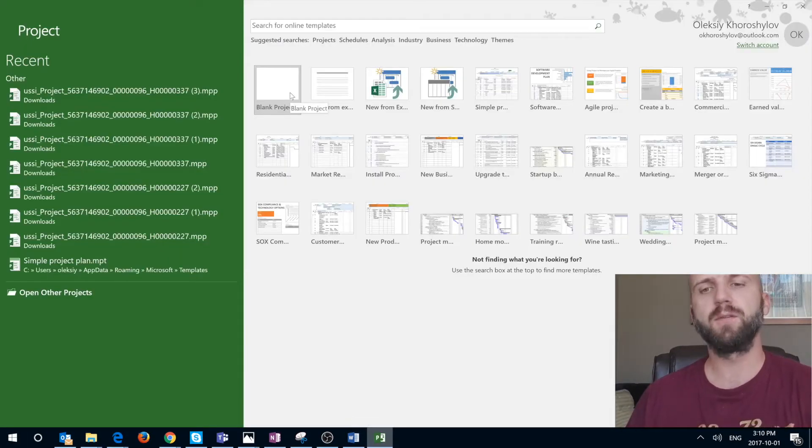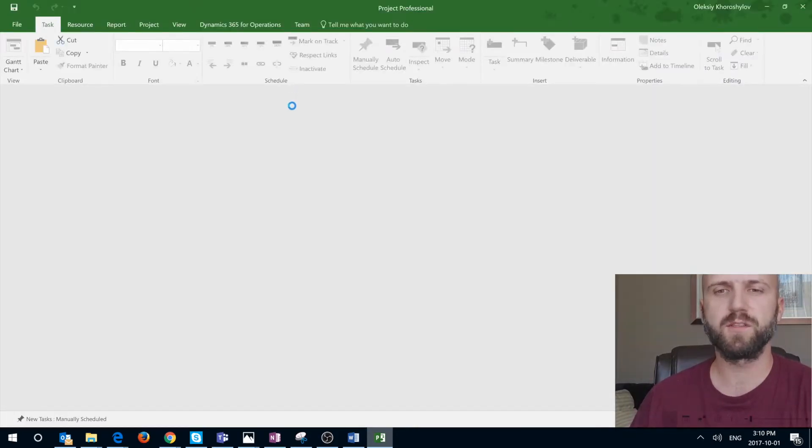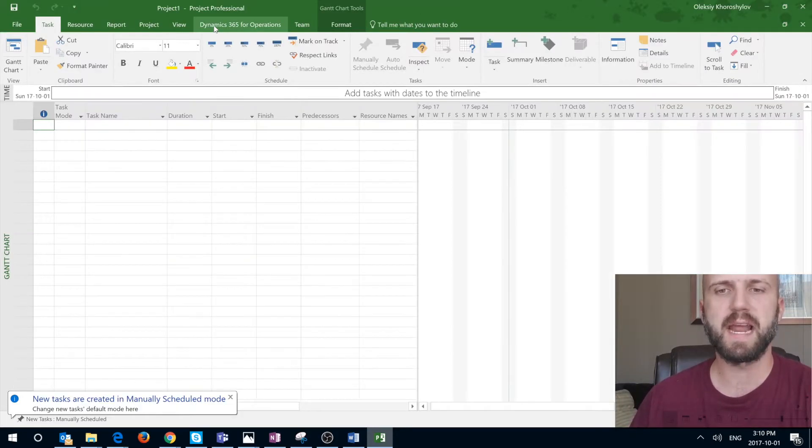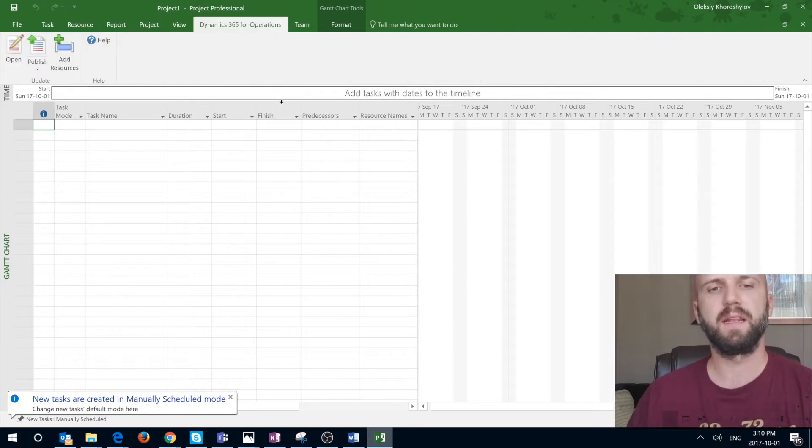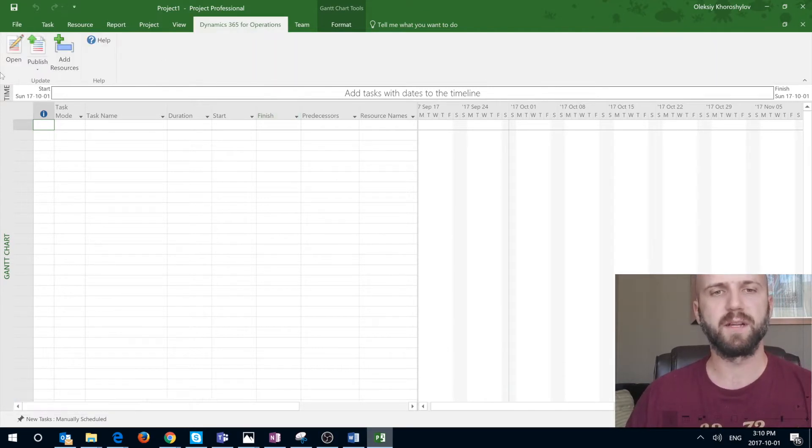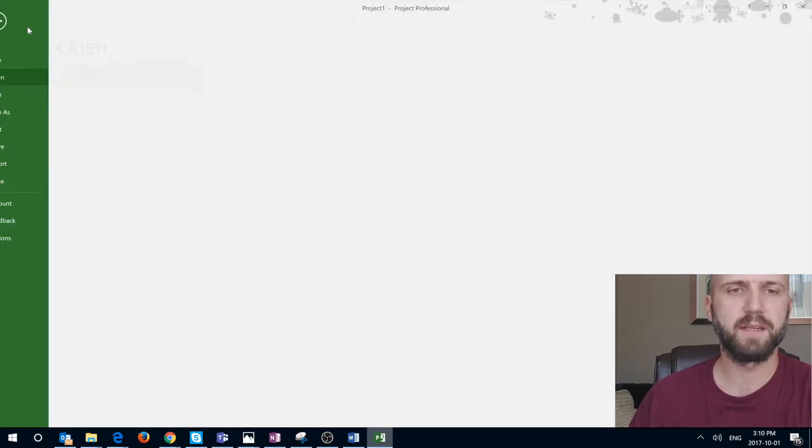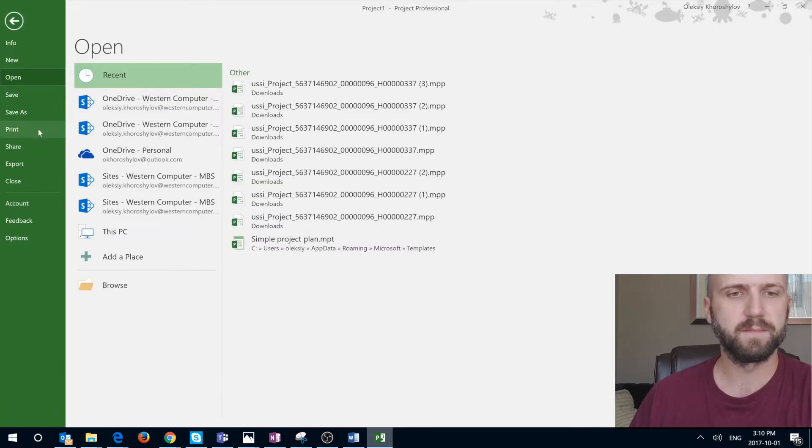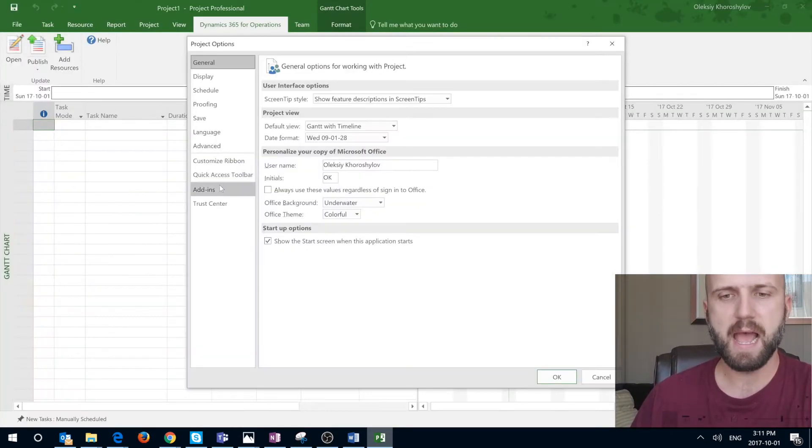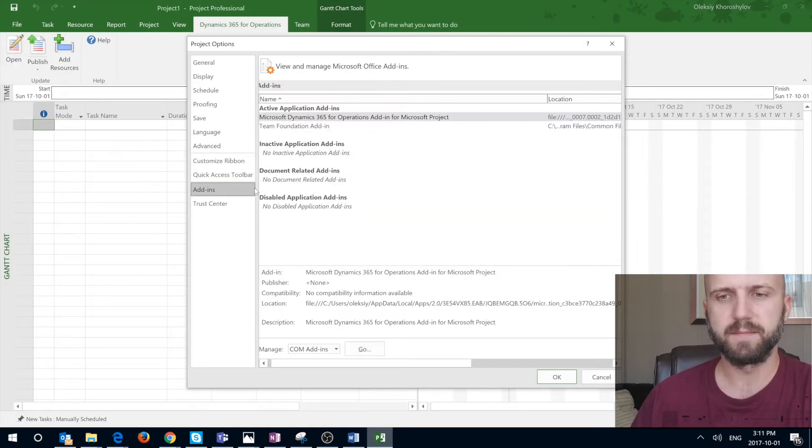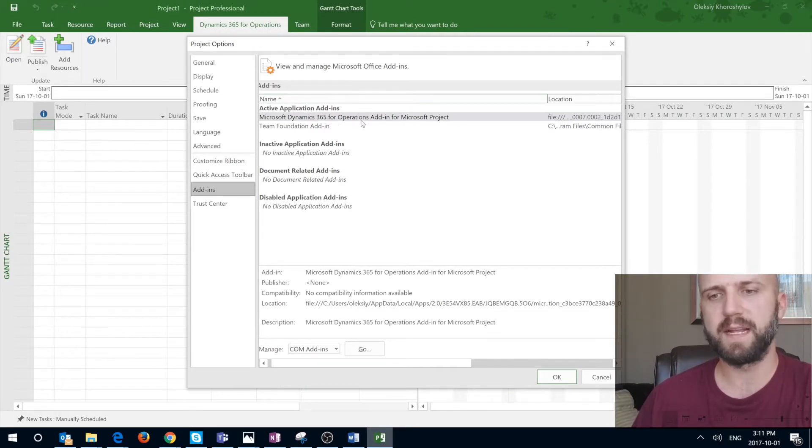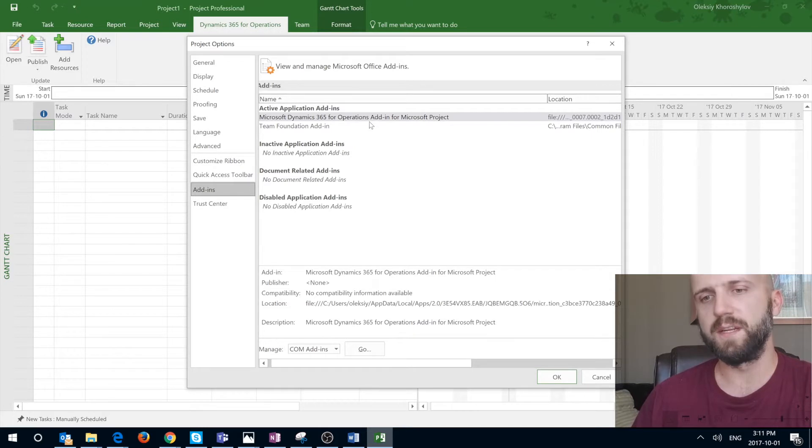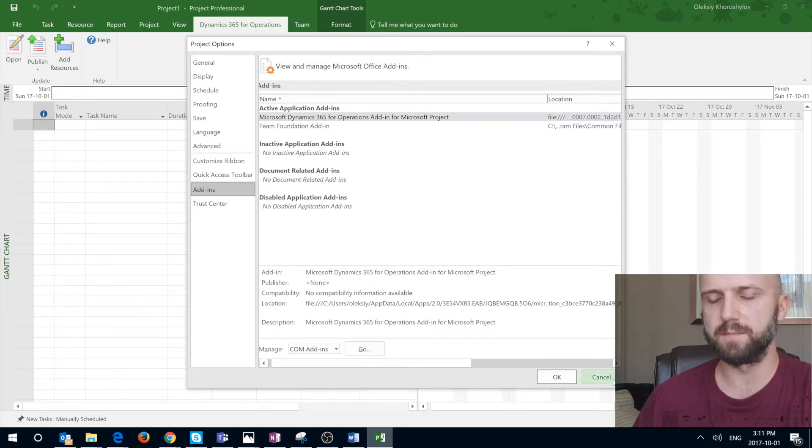So how do you know if that installation went successfully? First of all you need to see that Microsoft Dynamics 365 for operations tab in your client with several buttons. You can also check your add-ins by clicking on file, options, add-ins and you will see that you have Microsoft Dynamics 365 for finance and operations add-in for Microsoft Project successfully installed.